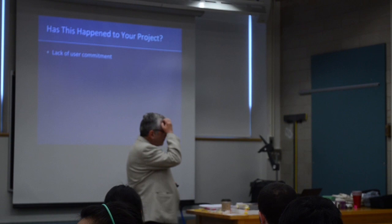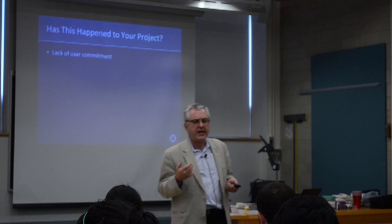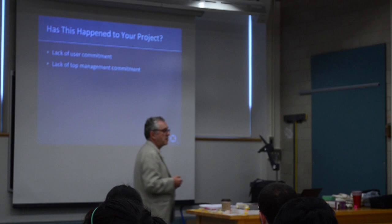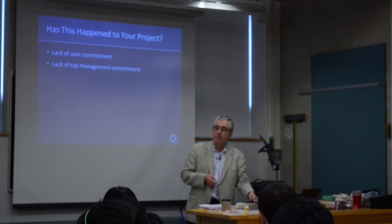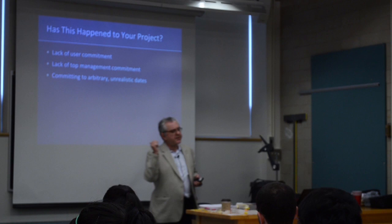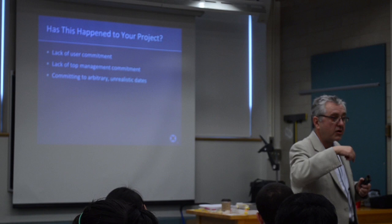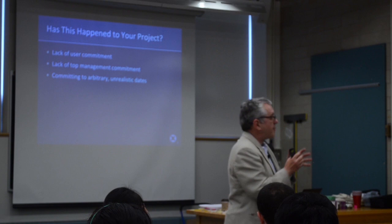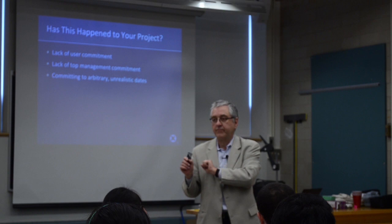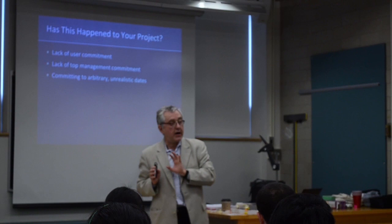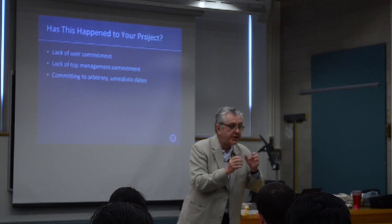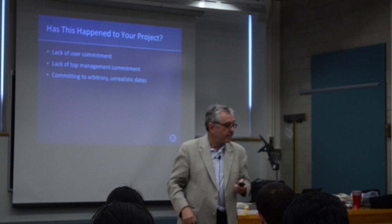For internal projects, lack of commitment by users and lack of top management commitment are significant sources of problems. Sometimes project managers are pressured to accept an arbitrary scope with a given budget and deadline. Instead, the right approach is to develop the scope, figure out what it's going to cost and how long it will take, then negotiate to arrive at a scope, cost, and time that is actually achievable rather than unrealistic.